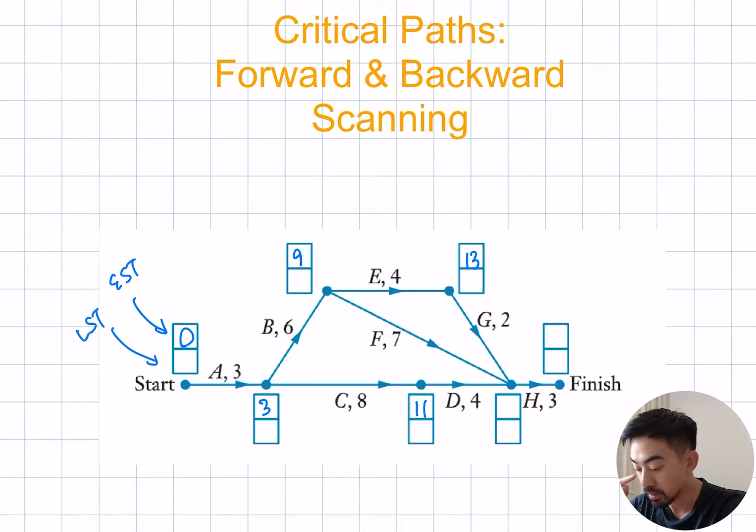Now here I need to make a decision because I have three edges which connect to my next early start time box. The first one is 13 plus 2 which is 15. The second is 9 plus 6 which is 16. And lastly 11 plus 4 is 15. We want to choose the biggest number. So that's 9 plus 7 which is 16. And then lastly 16 plus 3 is 19. So our forward scan is done.